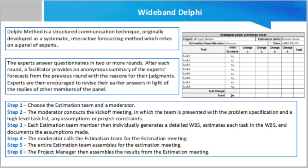Step 5.10 — steps 5.7, 5.8, and 5.9 are repeated until one of the following criteria is met: results have converged to an acceptably narrow range; all team members are unwilling to change their latest estimates; or the allotted estimation meeting time is over. Step 6 — the project manager then assembles the results from the estimation meeting.